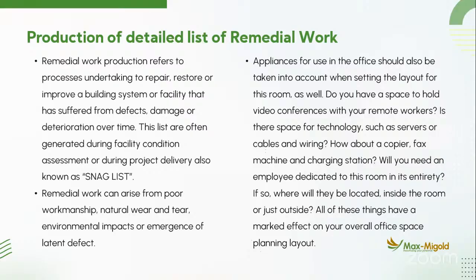Remedial work production refers to processes undertaken to repair, restore, or improve a building system or facility that has suffered from defect, damage, or deterioration over time. The lists are often generated during facility condition assessment or during project delivery, which is also known as a snag list. Remedial work can arise from poor workmanship, natural wear and tear, environmental impact, or emergence of latent defects.